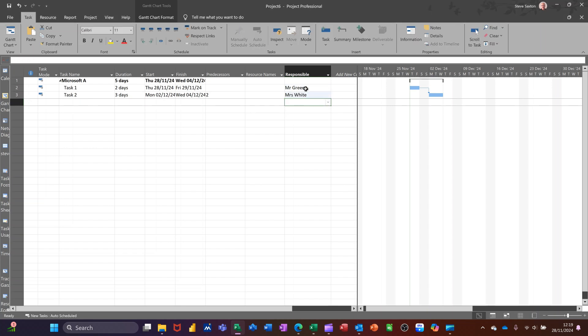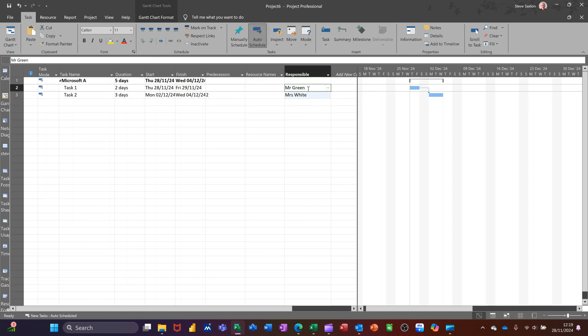Now, that doesn't mean that there are resources for these tasks. They're just somebody you might want to call if there's an issue with that particular task. Don't confuse this with resources.